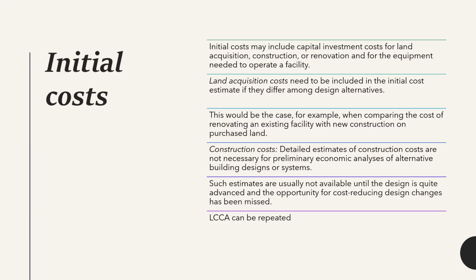In the construction cost, detailed estimates of the construction costs are not necessary for preliminary economic analysis. We might not be able to have detailed estimates of the construction costs at the very beginning. Therefore, for the preliminary economic analysis, it might not be necessary to have the detailed estimates, but later we might need them. Such estimates are usually not available until the design is quite advanced and the opportunity for cost reducing